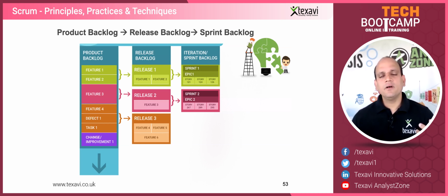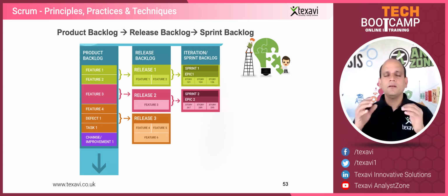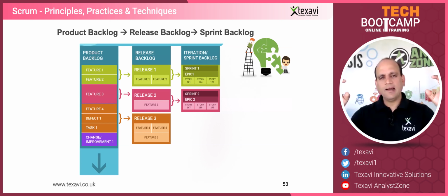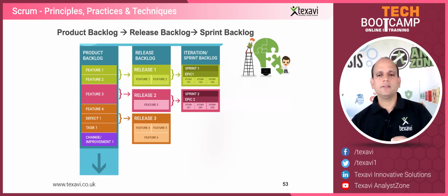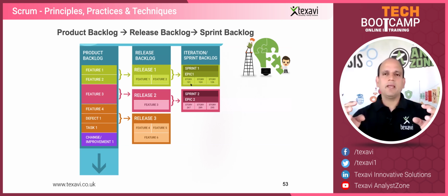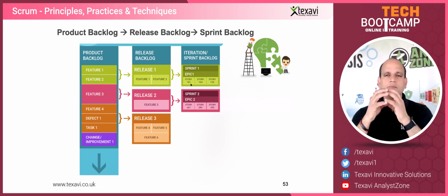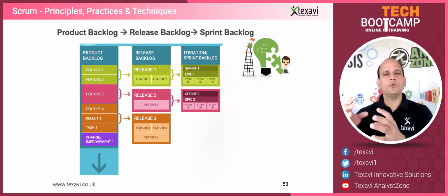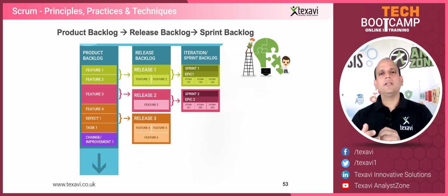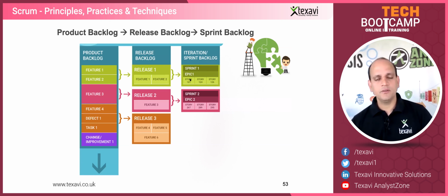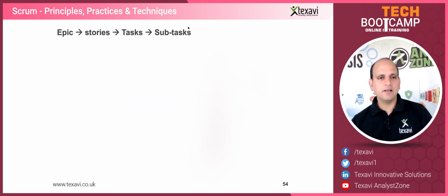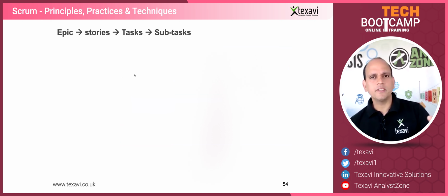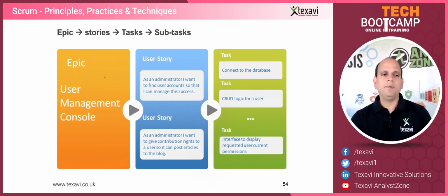So instead of them asking those questions by themselves, why don't you come up with the detailing to break up this whole thing, the catalog, into those pages. So we'll break that big, huge feature called catalog into the epics and then the stories. And that's what goes into the stories, right? Item catalog, item list, item list page, item details page, item photo, show the item photo, show the item 360-degree view, right? So all of these are basically the stories. So you actually are getting into the details of that implementation. And that's what gets done with this kind of breakdown, with the subsequent breakdown of epic, user story,